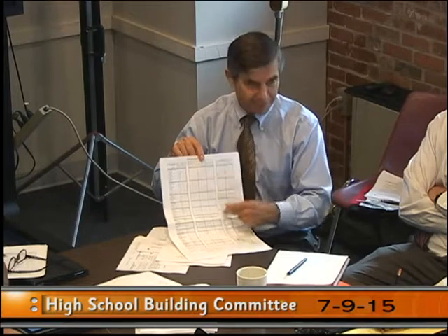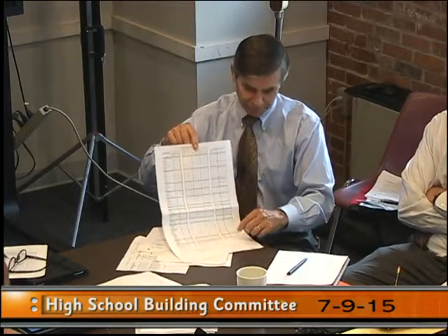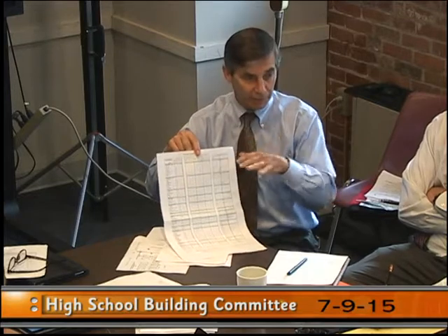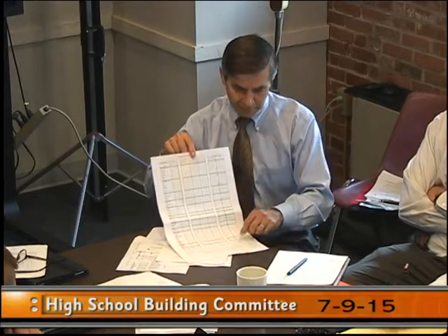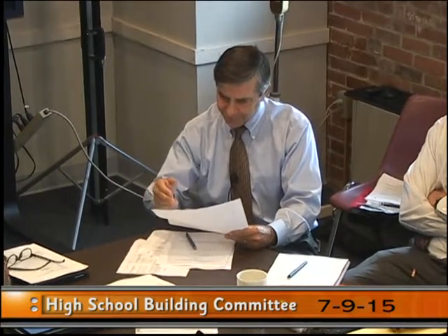As a guide, on the right side of the page is the MSBA so-called template. They have guidelines for schools based on enrollment, and this is an Excel spreadsheet. As soon as you put in the enrollment, and for Stoughton High School it's proposed as 1,065 students, which was already agreed upon between the town and the MSBA before we came on, it populates this whole column. We have to temper what this means, but I'll read some highlights. It says in their guidelines there should be 37 general classrooms of 850 square feet, and 10 science labs of 1,440 square feet. I shouldn't use the word should, but it suggests there could be 8 special ed classrooms, 8 small group rooms, and so on down the list.